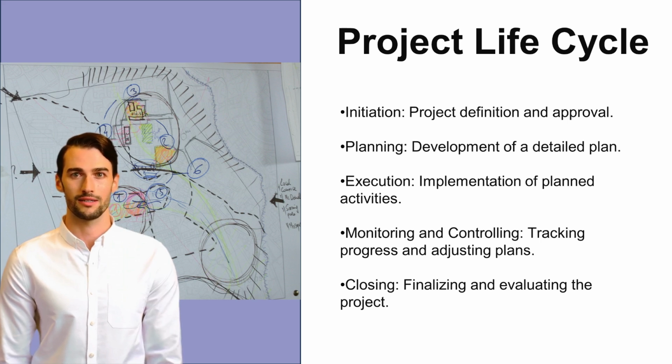Closing. The project is formally completed. Deliverables are handed over, and activities include obtaining acceptance, capturing lessons learned, releasing resources, and closing out contracts. This ensures all objectives are met and the project is concluded.